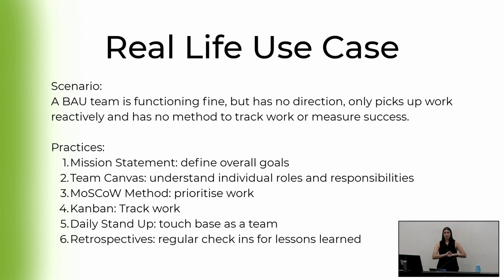And then we also implemented a daily stand-up. We never touched base as a team. So it was good to have a little moment each day to come together, say hello, and also talk about, well, what are you doing today? What am I doing today? Having that mental preparation to set us up for the day ahead.